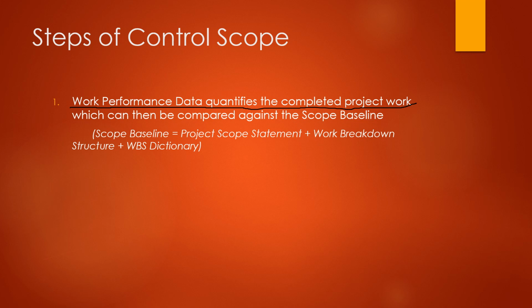What is the scope baseline? So again, briefly we have covered it here. Scope baseline is basically project scope statement, right? That's a document that states what is the project scope. Then work breakdown structure, which is WBS, and WBS dictionary, right? So these 3 documents make up the scope baseline.